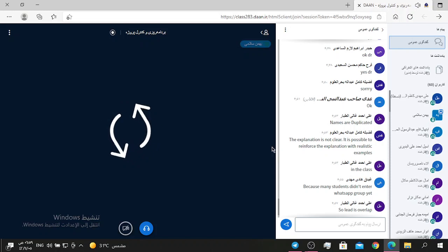Means that write draft is an activity, edit draft is an activity. There is one relationship between them. The relationship is start to start, SS. And the lag is 15 days.